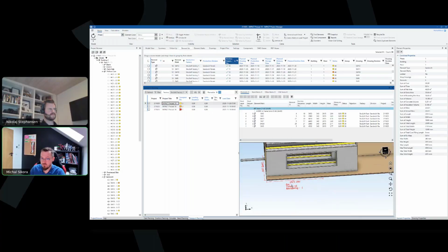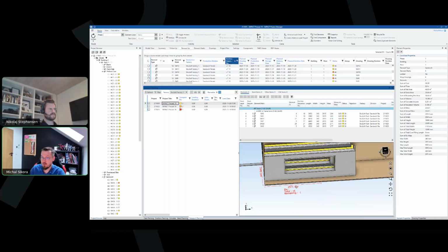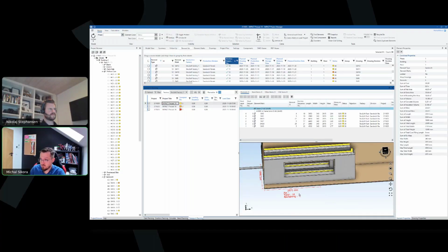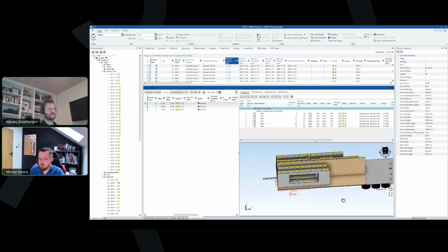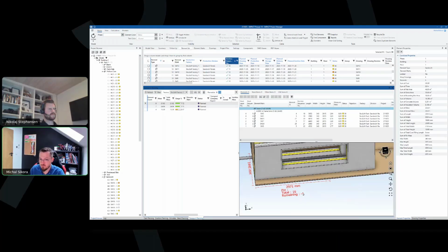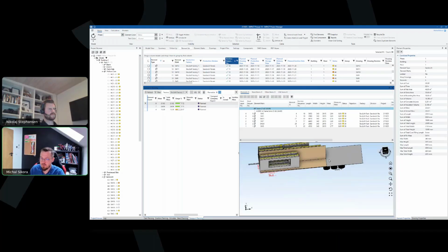And transport also gives you some quick info on the capacity of the trucks, so how much they're loaded with. We still have some capacity on this truck, but maybe no point in loading it any further. You also see some calculations, like the actual loads on the trucks. You can see that this whole stack exceeds the pin load in this particular place. Nothing simpler than just moving that bucket.